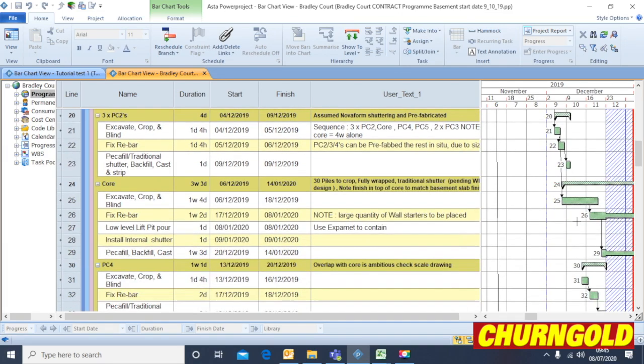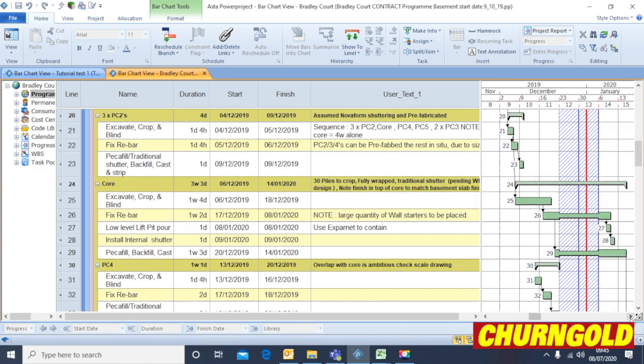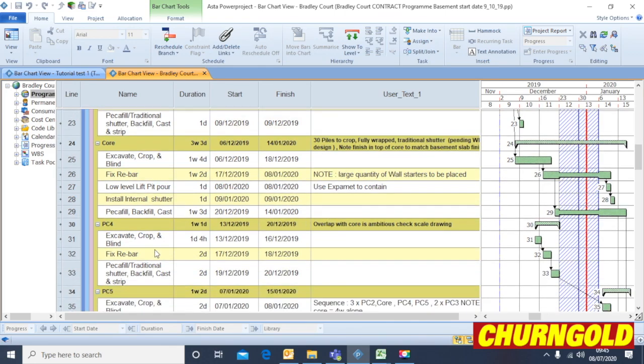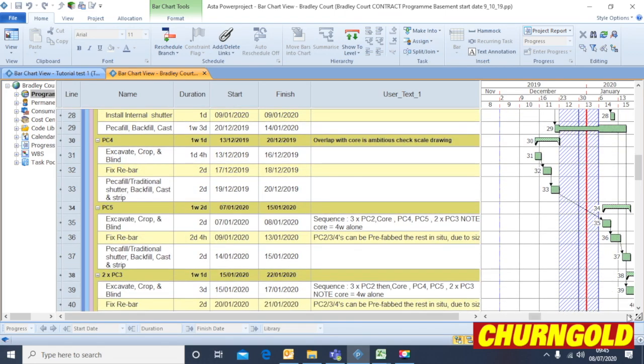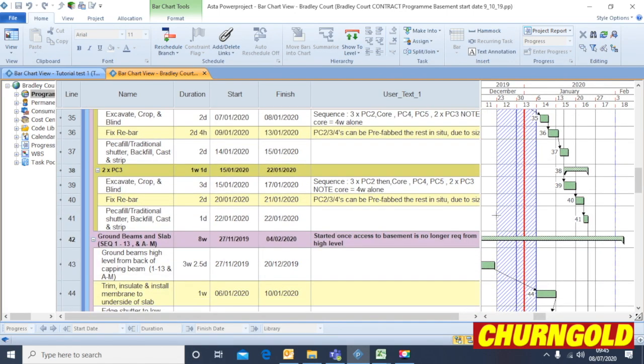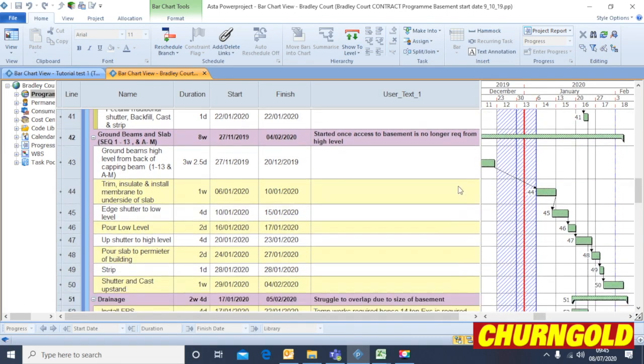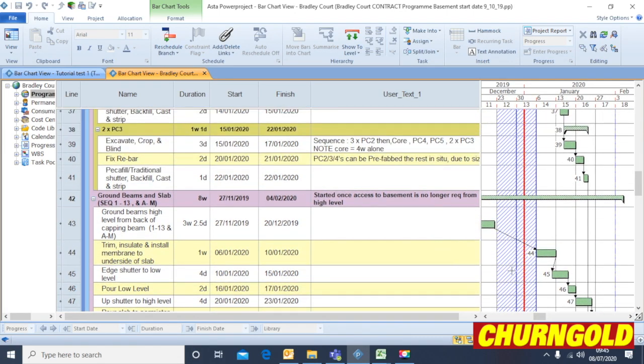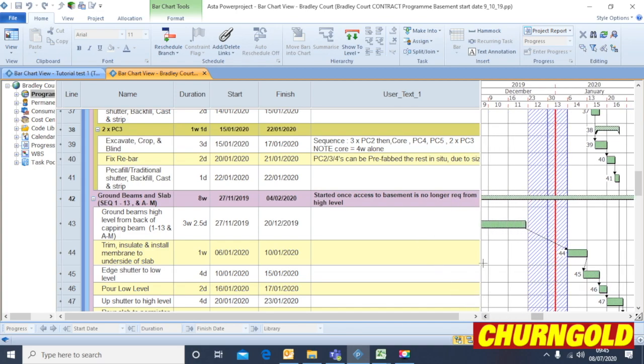And obviously they're repeated over and over. The core is obviously slightly bigger and hence slightly longer duration. And then you can copy and paste like exercises further down the page. Some tasks overlap if they're in different work areas and if you've got different gangs working on them.